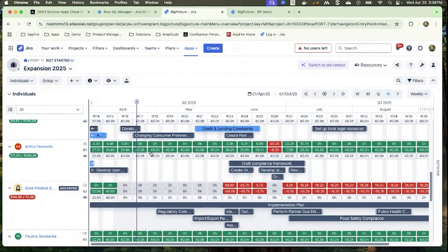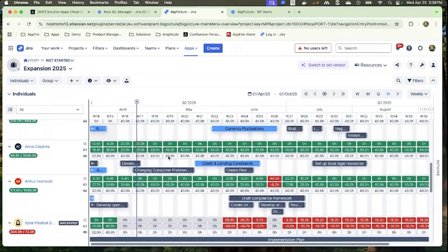And when you create an issue, give me a beginning date and an end date. And with that little information, we can roll up things. Okay, here's a good one right here. Anna has been assigned 20 hours of work for this week. She has 20 hours remaining. Here's her overall capacity. Now, we understand this capacity because we've got that handy dandy cross-reference table. How many hours a day can I allocate and what have you?